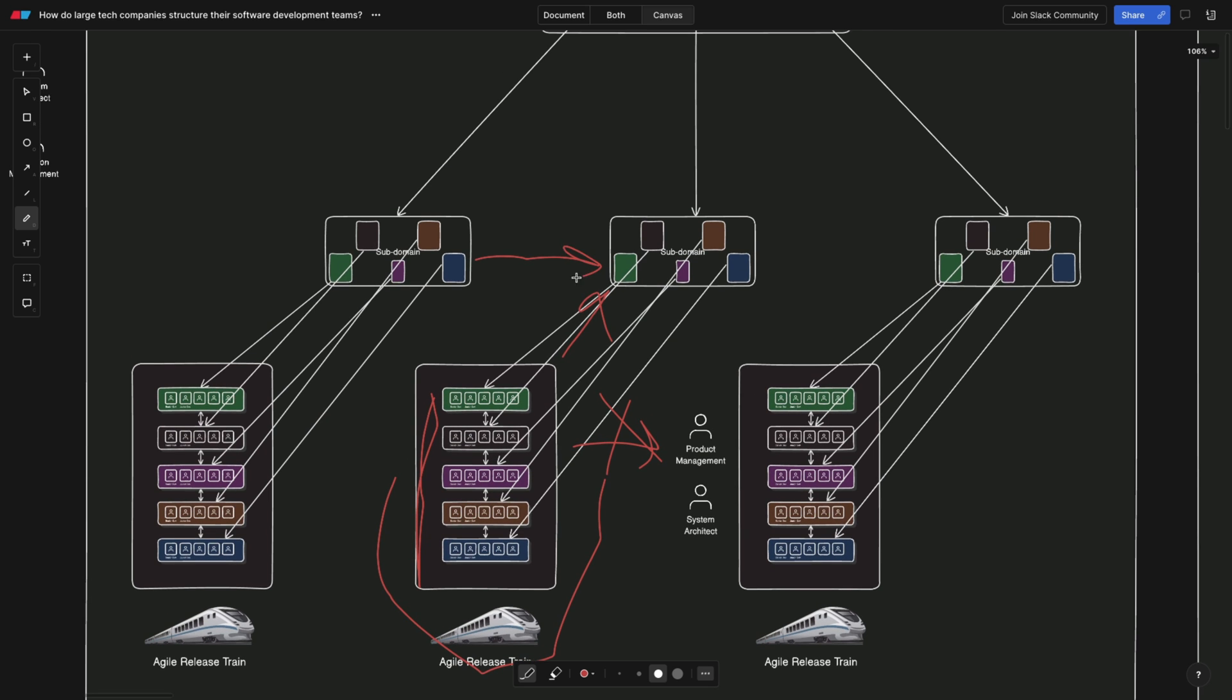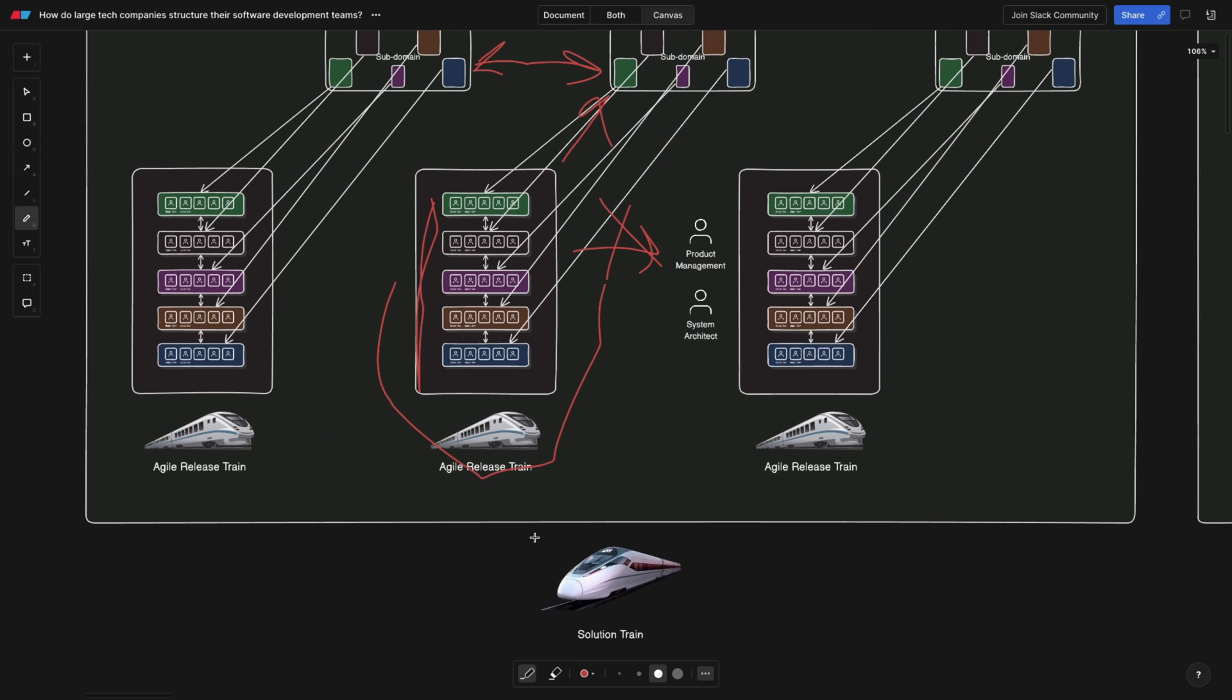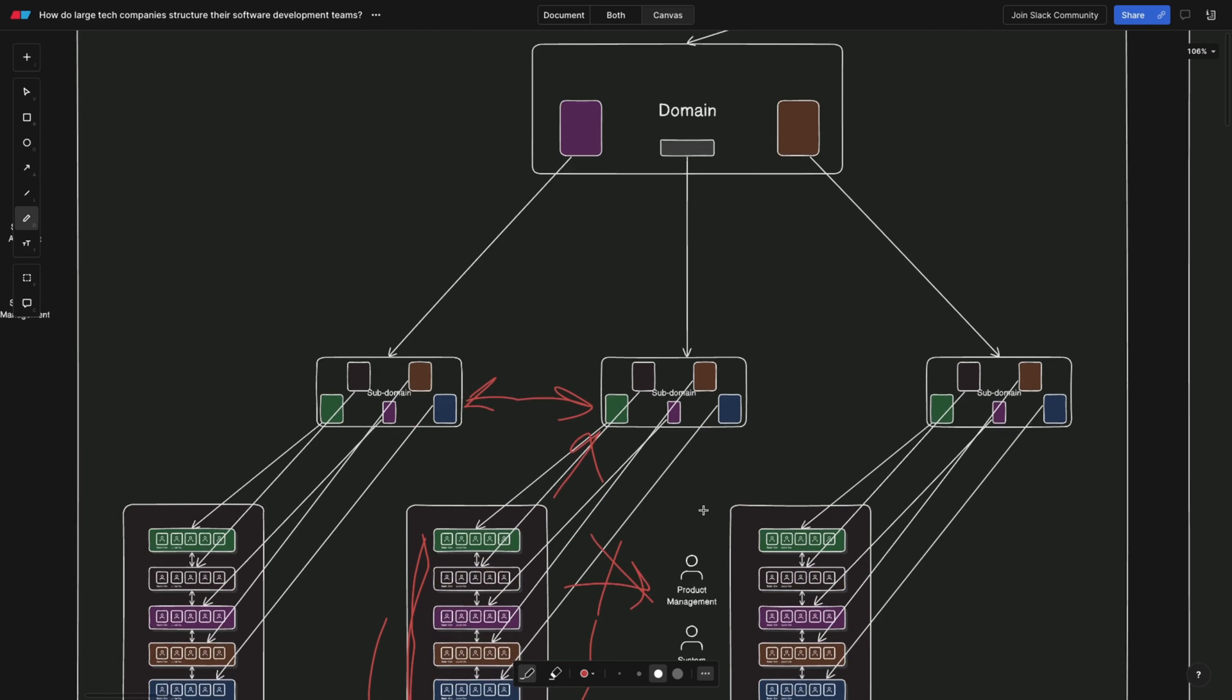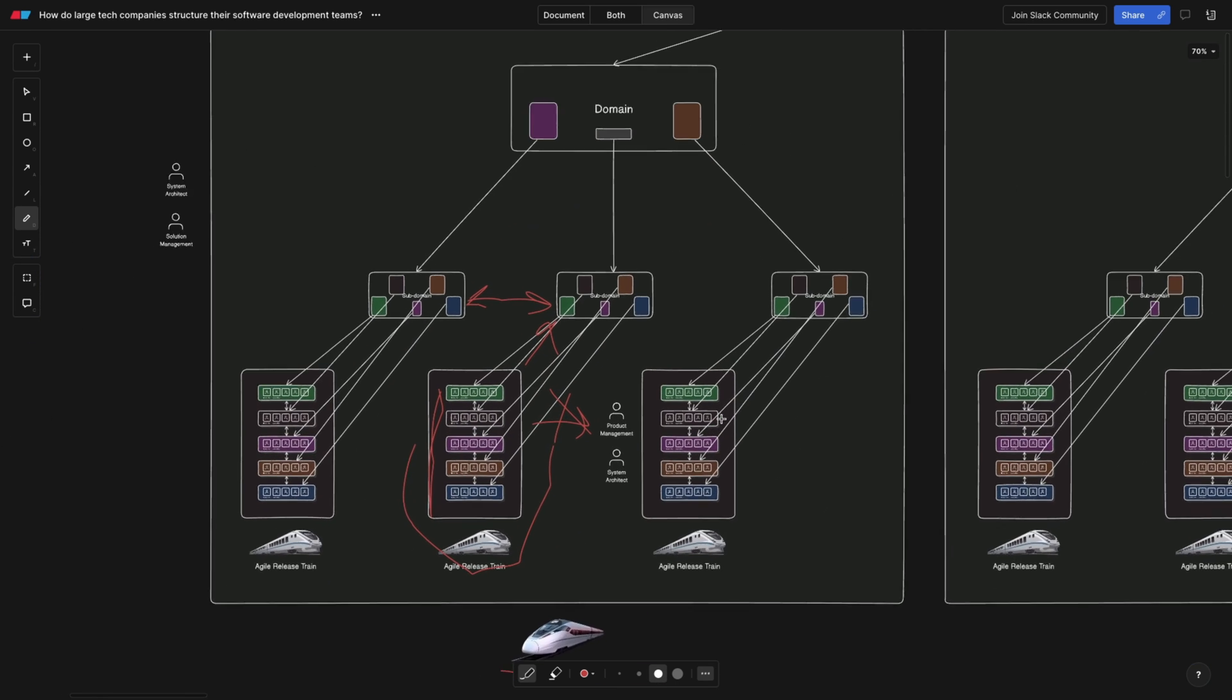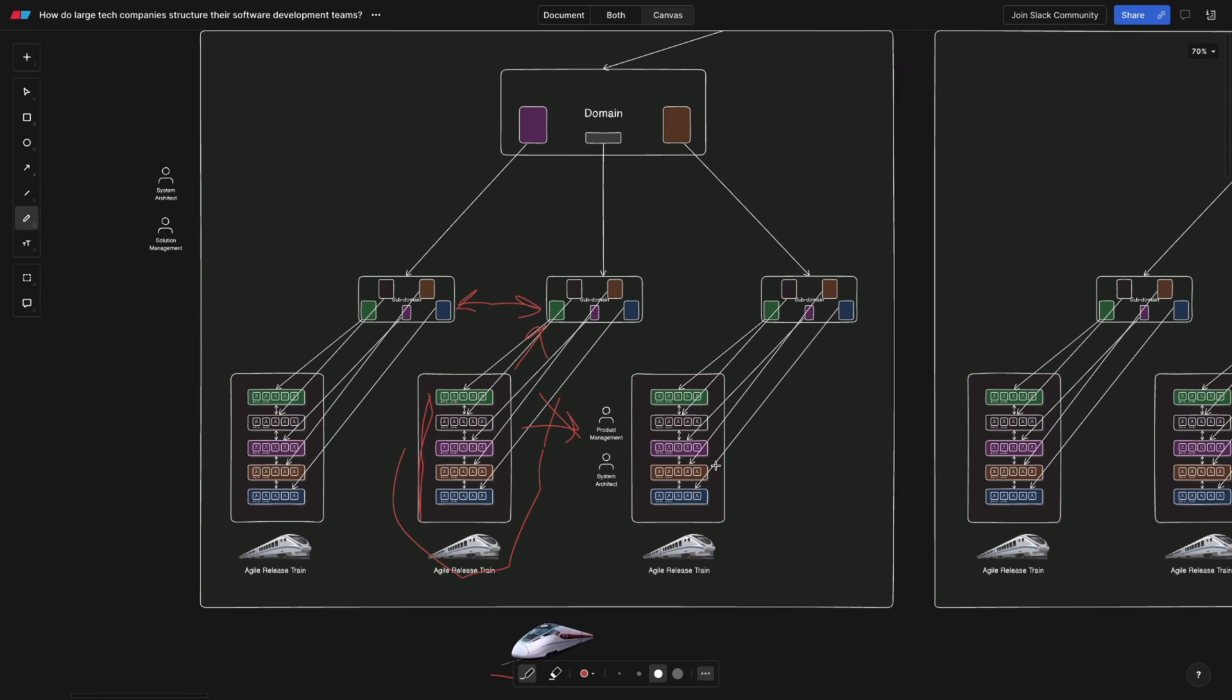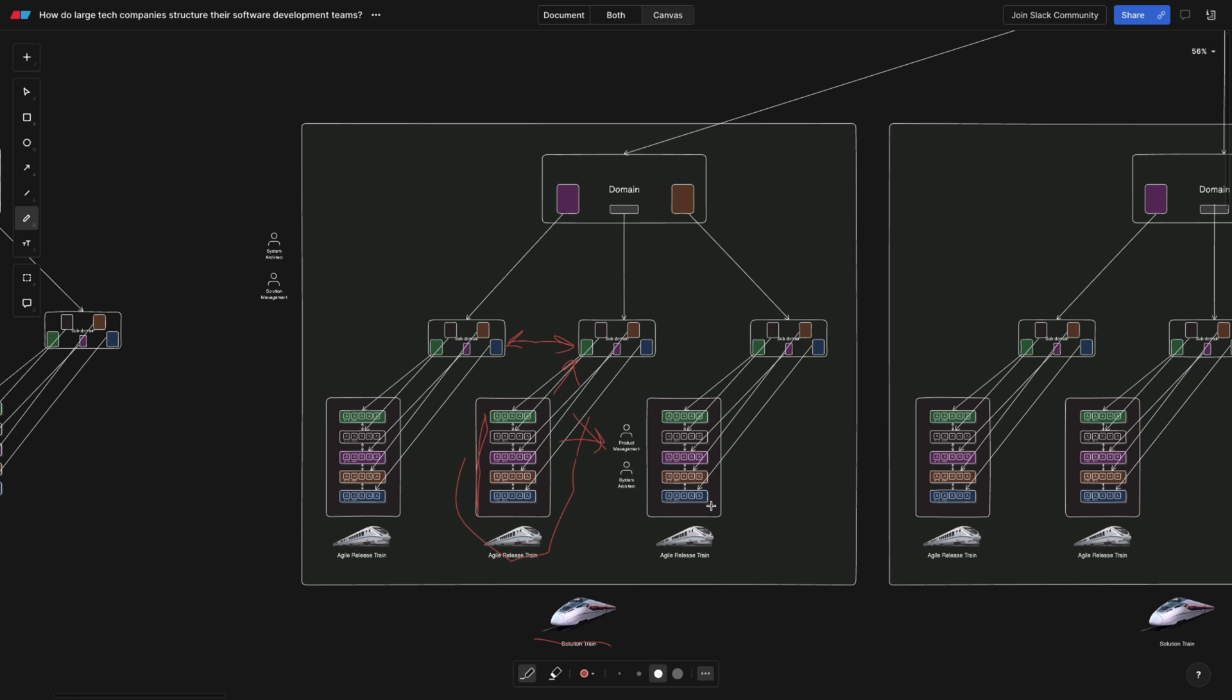The answer is we add another train on top, a solution train. ARTs, aka agile release trains, now act as teams and need to align within the solution train. Now, you see that we have a clear hierarchy of value flow. Exactly the same ceremonies are held on a solution level. For example, if we talk about the product side specifically, then this is going to be like which ARTs will be tackling which features. These features are then tackled on the ART level and are distributed to teams.